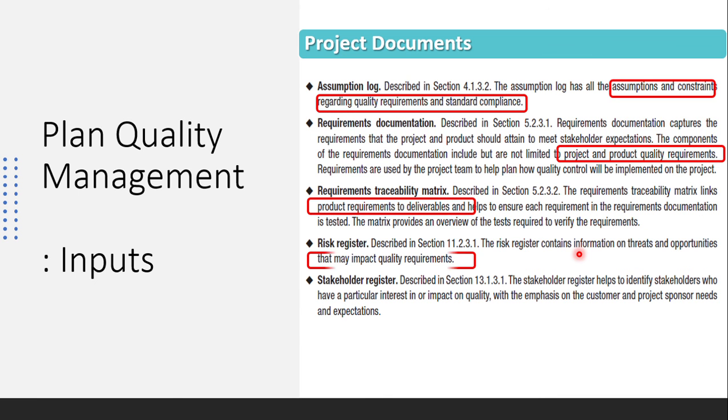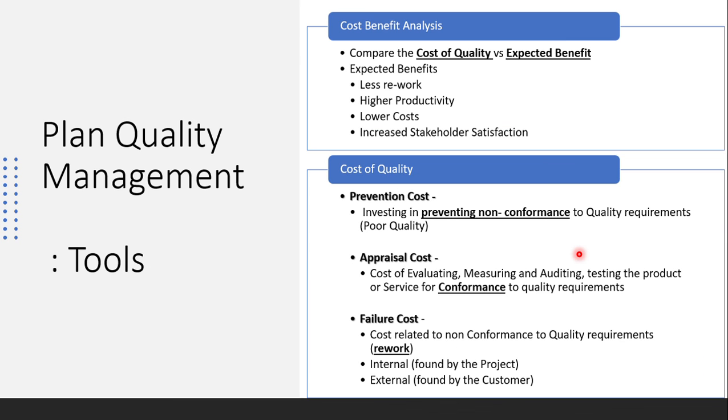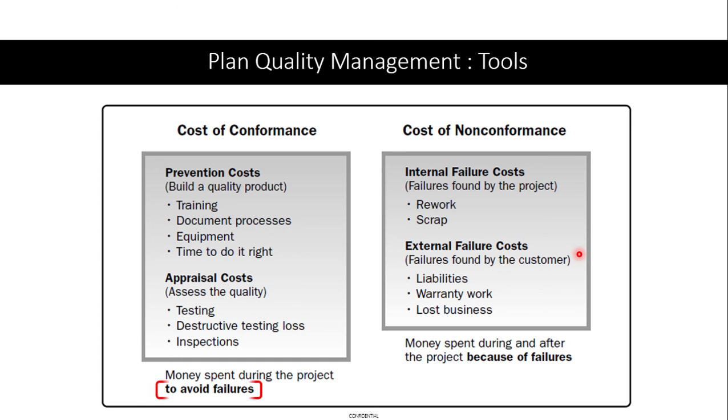So these SLAs we hang on to. Yes, SLAs. Those are actually coming here, right? SLAs are basically a contractual obligation that you have to maintain. You have to maintain 99.99 uptime. Your system, whatever you deliver, should be able to stand 99% uptime.